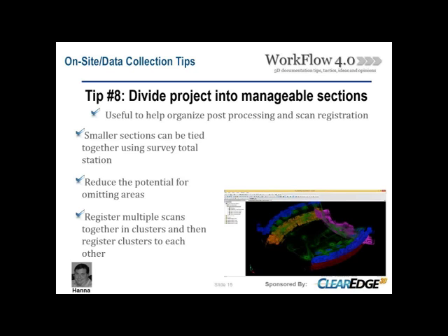It's going to really simplify field operations, and it's going to really organize the post-processing and registration in the office. Really help keep things manageable, and using this in combination with survey control is going to really help ensure that you're continuing to keep things registered and accurate as you're bringing the project together into one complete point cloud.